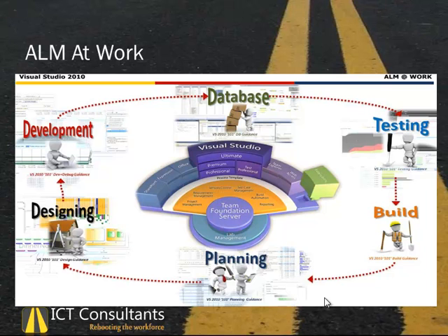Okay. Then I told you when the designer is busy with making his technical documentation, he must absolutely work together with the tester, who is doing testing there. Absolutely. And when he makes something, he is busy with the method of his design, but the tester at the same time must create his test cases or test scenarios based on the design. Okay? If there is some change here, he or she must absolutely be informed about that. Because everything he or she does must be absolutely compatible with the design right now.